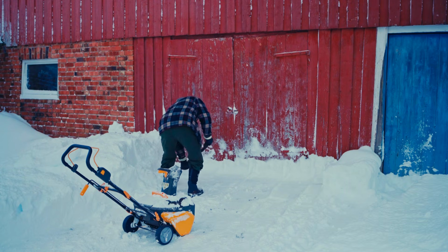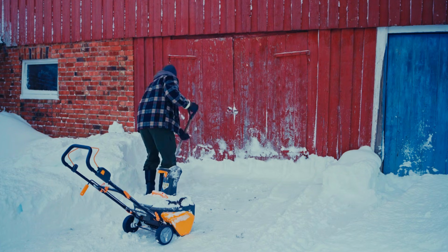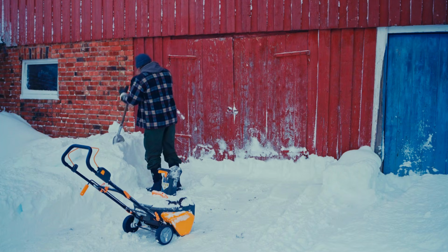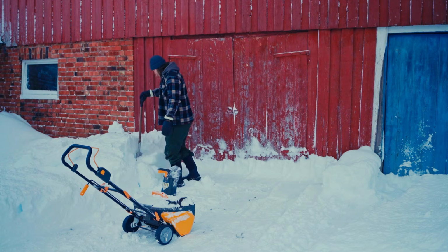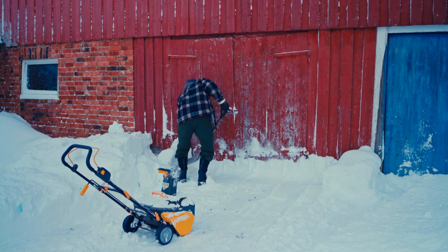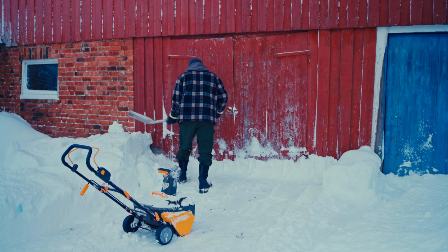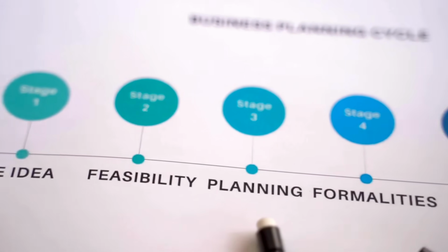Requirements should also be measurable, using performance indicators or metrics to track whether expectations are being met. This might include statements like 95% system uptime or response time under 1 hour.